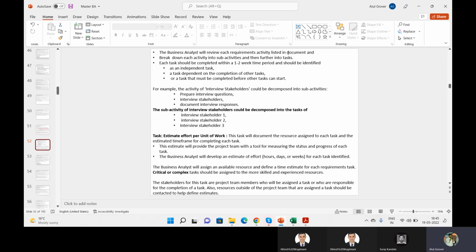I will break this high level requirement into separate stories. One, create a web page. Two, put the two fields, username and password, on that web page. Second unit of work, put the validation for that particular thing. Third unit of work. Fourth, put the two buttons OK and cancel.